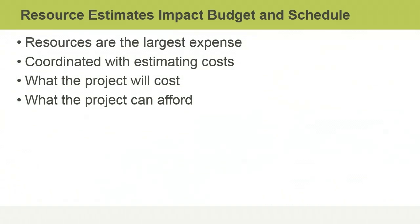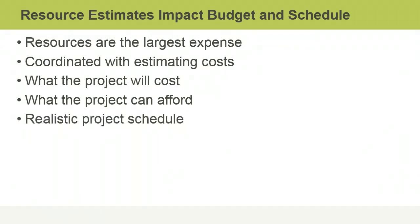In addition to providing information used to create the project budget, activity resource estimates provide information needed to create a realistic project schedule. For example, if certain equipment or human resources are available only on particular dates, this will affect when you can schedule relevant activities.